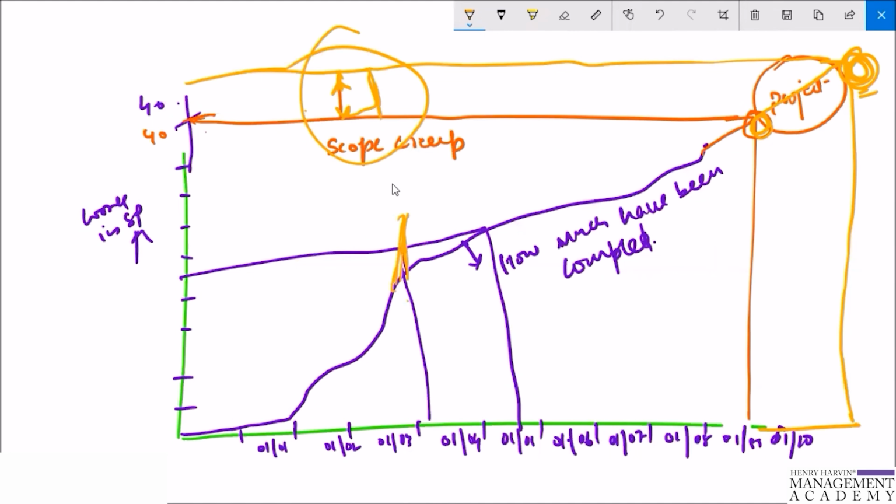So these indications of the progress of the project and of scope creep give better visibility than the burn down chart. The scope line allows you as a scrum master to easily spot where work is being added, with an effect on the completion date. Whether this work is being added by the client or the team, it is an important signal that the completion date may need to be moved in response to the increase in scope. The scope line also tracks where work is being removed to meet a fixed deadline. Again, this is important to know, as it may impact the quality or functionality of the project, and it needs to be clearly discussed with the client and the team.